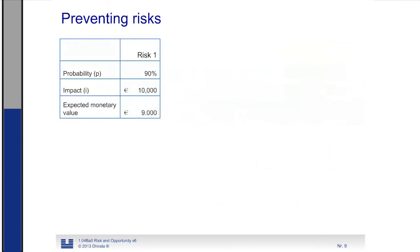When you have done this quantitative analysis, you need to think about what you could do to prevent certain risks. Let's say this first risk has to do with an event that we will get our permit too late and the impact would be that I need to put in a lot of overtime to make this up. As a project manager with my team, we need to think about what we could do to prevent this from happening.